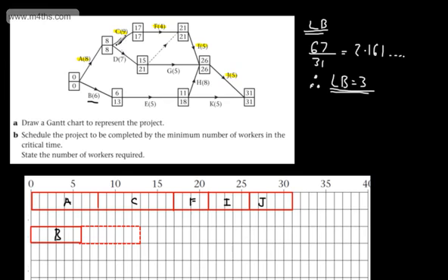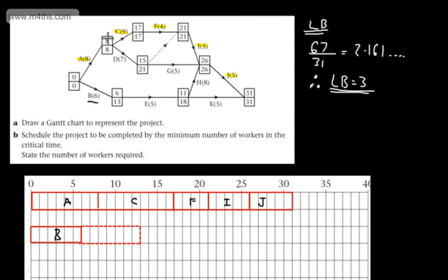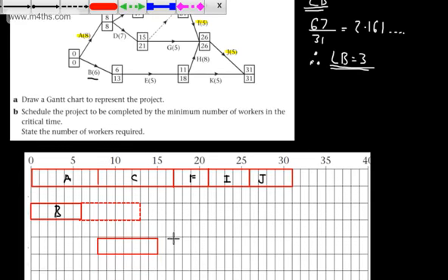Okay, alphabetically, next one is going to be D, as we got C in the critical path. So we're going to put that on. We can start that now at time 8. It's going to take 7, and we can go up to 21. So here now is the 8, so let's put that on. We've got now time period of 7, which will take me to the 15, and then we've got now 21. So if you want those key pieces of information, you've got now 8, 15, 21. So let's do that, and we'll go out to 21.